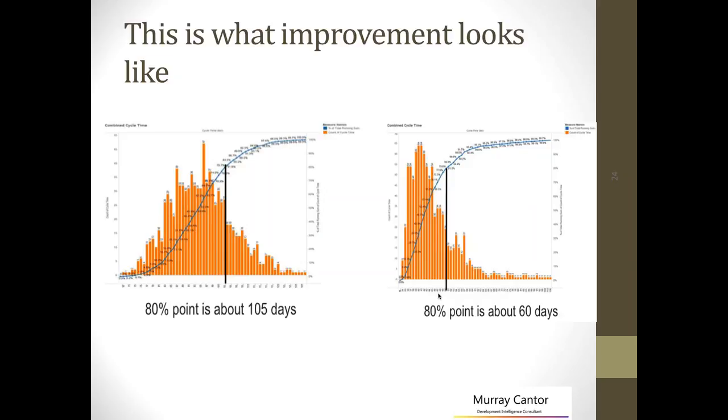Now, what the team continually has to do is monitor this 80% point. And if they see the 80% point is moving in the wrong direction, they immediately have to ask the question why and see what has changed in their environment and respond to it. So this isn't a one-time exercise. This is something that's continually monitored through these organizations. And what you'll find is that they will change, not stable things, because of the kinds of problems that will happen, there'll be a new thing inserted, there just are naturally peaks and valleys of work to be done.